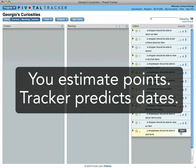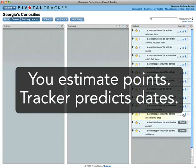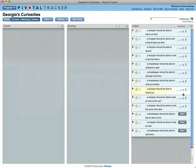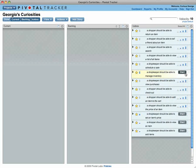Use one point for straightforward stories, two for more complex ones, and three for very complex stories or those you don't yet know how to approach.